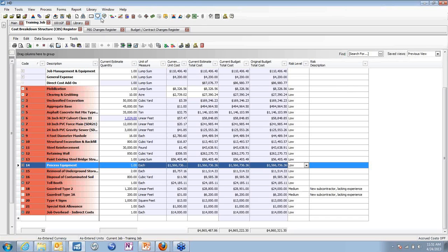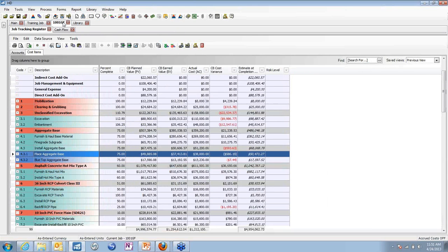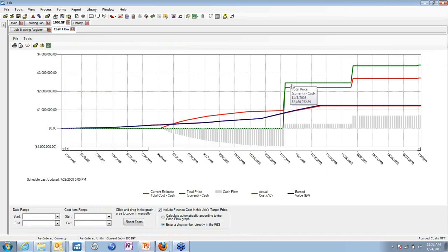And when you do that, we jump back to that cash flow we were looking at. The cost and revenue that you're figuring out there, you can see that it's reflecting some payment timing, this kind of stair step every time I'm getting paid. And there's an entire set of cash flow options that allow me to set up my payment timing to be able to manage that. Last thing I'd say with that is, if you do need to have your schedule be cost loaded, maybe that's part of the analysis that you're doing or that you need to send, you can take all of the cost information that is being calculated in Hard Dollar and push that over to Primavera.